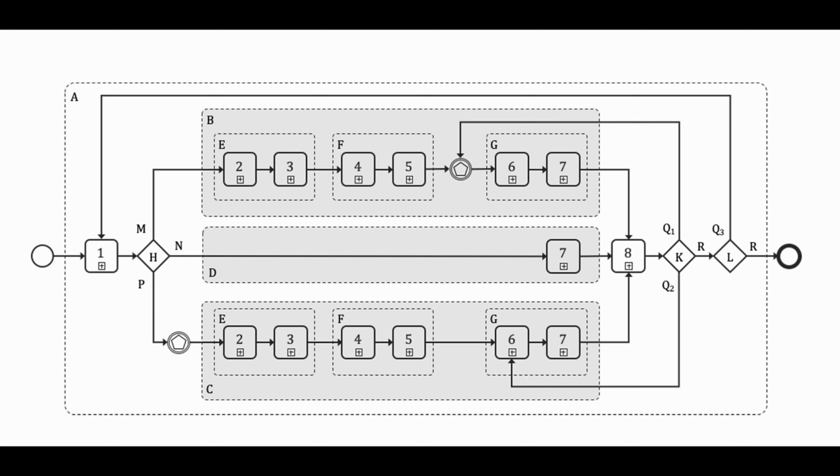Once the event occurs, the process proceeds directly to information production. Unplanned events. Here, procurement and contractor selection are a reaction to the event itself. The process follows the familiar route from ISO 19650 Part 2, starting with an invitation to tender.